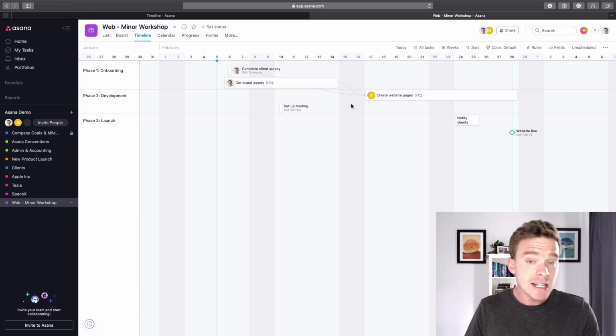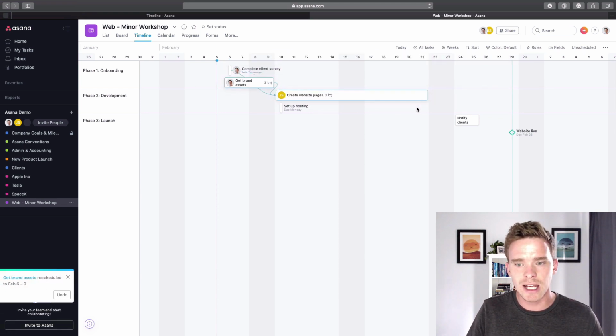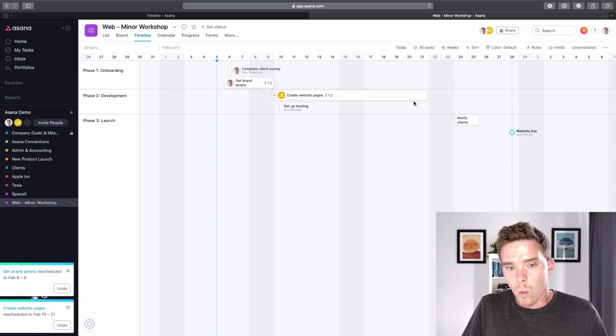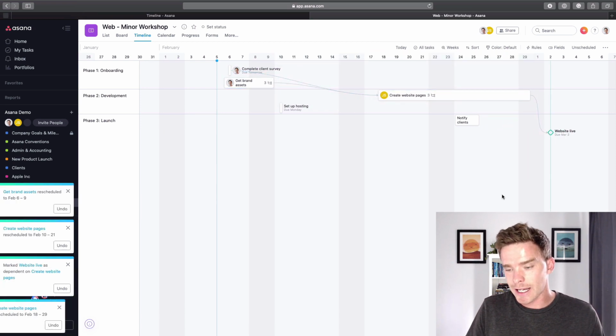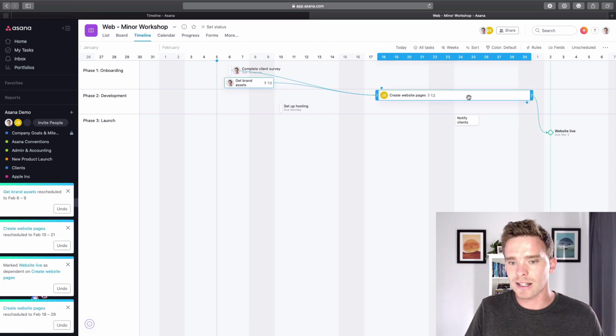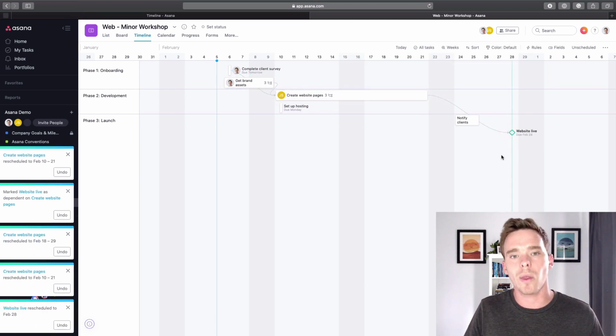Now, based on your project, you may find that you actually don't want that to happen. A good example would be, let's say that we need to do the website pages before the website can go live. So if I push that back, as we said, the website live milestone has now adjusted, but maybe this is a really important deadline. I do not want that to move.